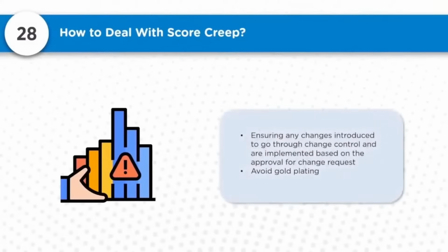Right, ensuring any change introduced goes through change control, so no changes without proper approval by the authorities, so that only what is required to be implemented is implemented, and that is done formally through the formal change request. So avoiding gold plating.